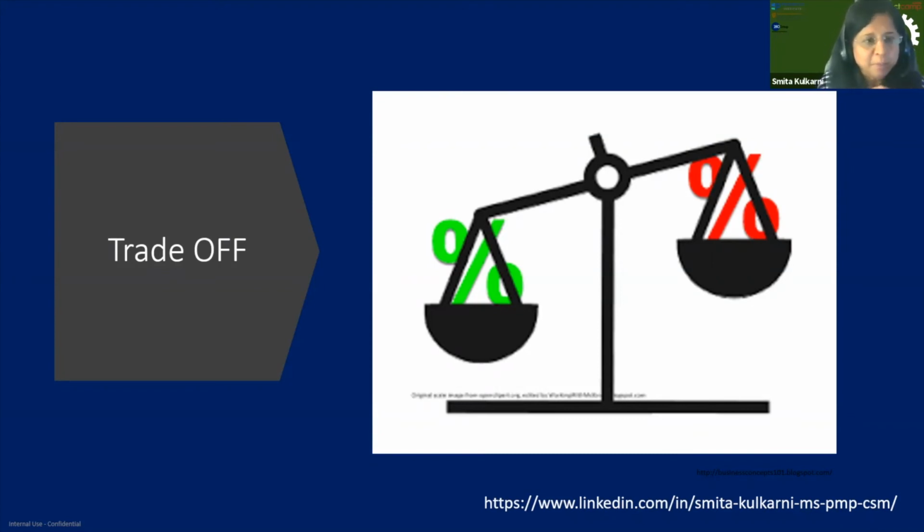This product prioritization and well-organized backlog helped us understand that the new requirement of the same size I am going to swap or trade off with another requirement in that backlog.